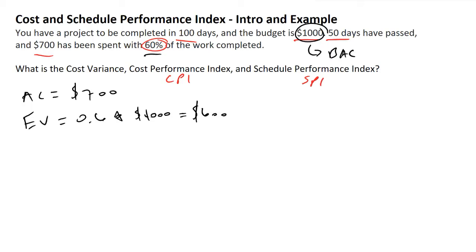Next, we have another term called planned value. Planned value will be equivalent to the percentage that should be completed per the schedule times the budget at completion. In this case, because we're at day 50 and we know that our project was supposed to last 100 days, that means we should be at least 50% of the way done with this project. We're going to be multiplying this figure by the budget at completion, that $1,000.